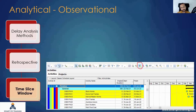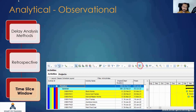The Time Slice Window is a retrospective method — it's analytical. We will not add a fragment or any additional activities in this method. It's also observational; it's both analytical and observational. You observe the delay.